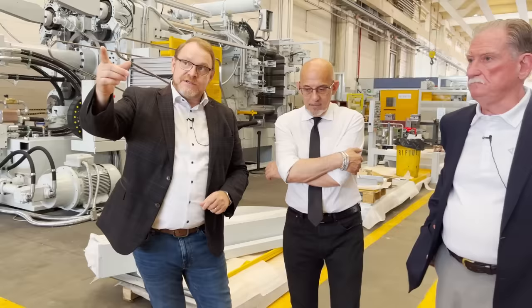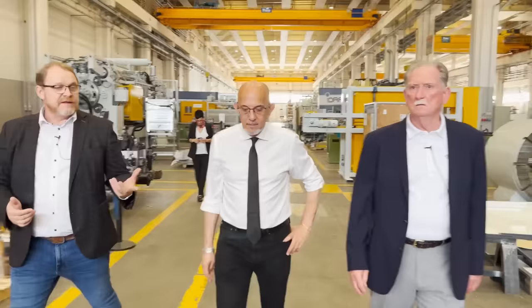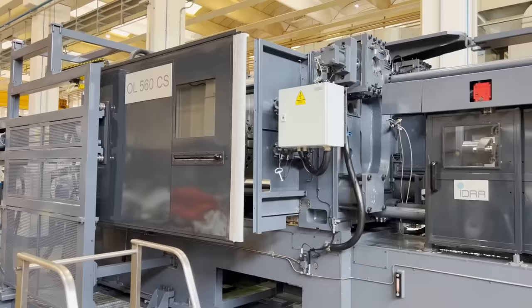Quite interesting here right now is that this machine is in testing, so you can actually see a machine moving, because not many of the machines are in test right now. Essentially this machine will be tested in a dry capacity. Here in Italy, we can't actually do any hot testing with aluminium, because of the facility. So we do a dry test where we run the machine in a simulated cycle. During that cycle, we do a soak test for 28 or 48 hours, depending on the customer requests. Then we take the machine apart. In this particular case, it will go into crates and containers, and then we'll ship it off to its final destination.